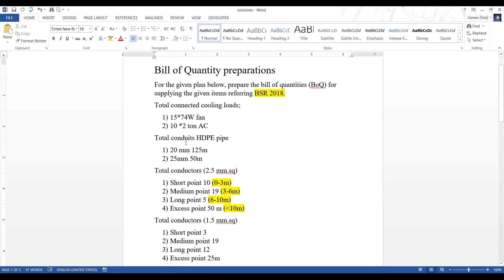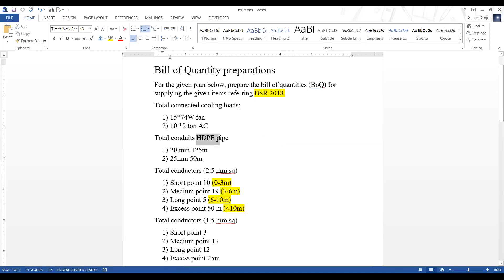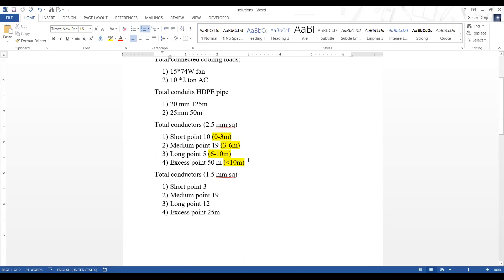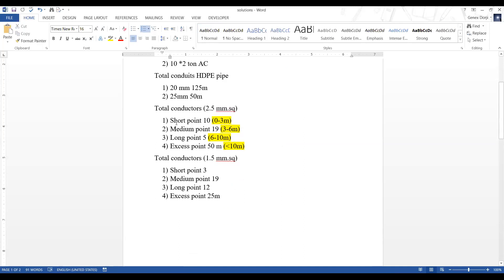The required conduit HDPE pipe is 20mm diameter of 125 meters - that is the quantity we have. The specification is 20mm diameter and the raw material is HDPE pipe. Then you also have 25mm diameter HDPE pipe with a required quantity of 50 meters. We also have to prepare the bill of quantities to supply the conductors.